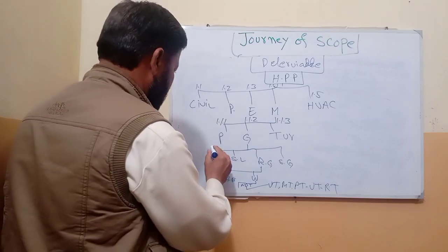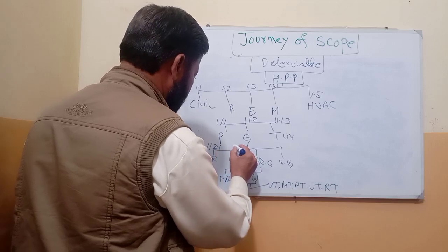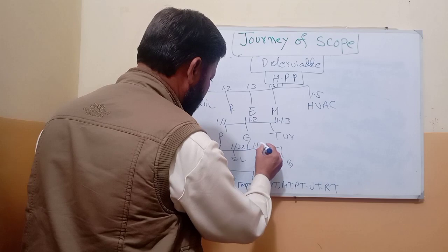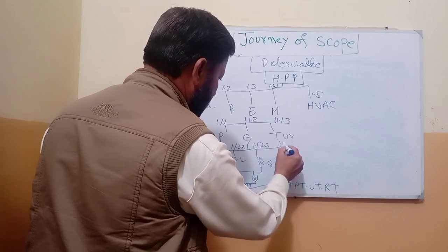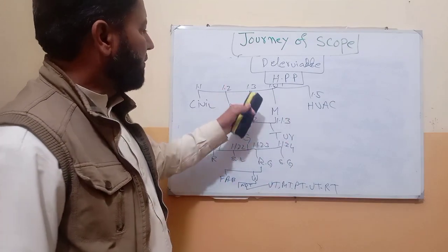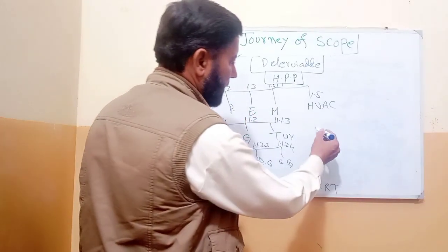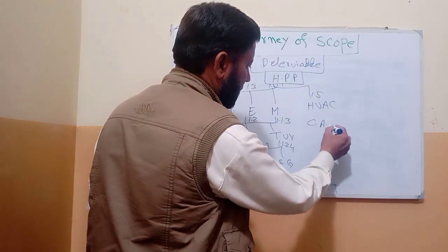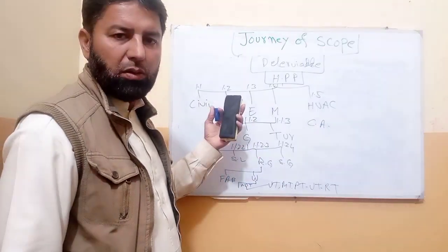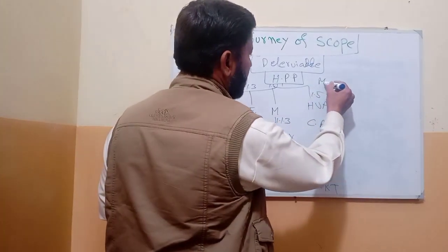This is divided further: 1.1.2.1, 1.1.2.2, 1.1.2.3, 1.1.2.4. These numbers 1.1, 1.2, 1.3 we call code of account. And this highest level is called management account. Some are called control account, some are called management account.